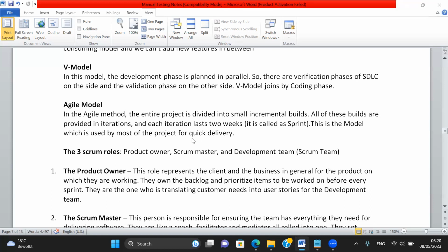When I say sprint, it means it is a Scrum. It is a sprint team, Scrum team. In Agile, we are having two things: one is Scrum and one is Kanban board. In Kanban board, they don't have a deadline. Whenever they are doing some innovation, they will not put a deadline of 2 weeks for that particular thing. In Kanban board, they will get the updates regularly, but they are not fixing the timeline. But when we take Scrum, they are having a sprint of 2 weeks.